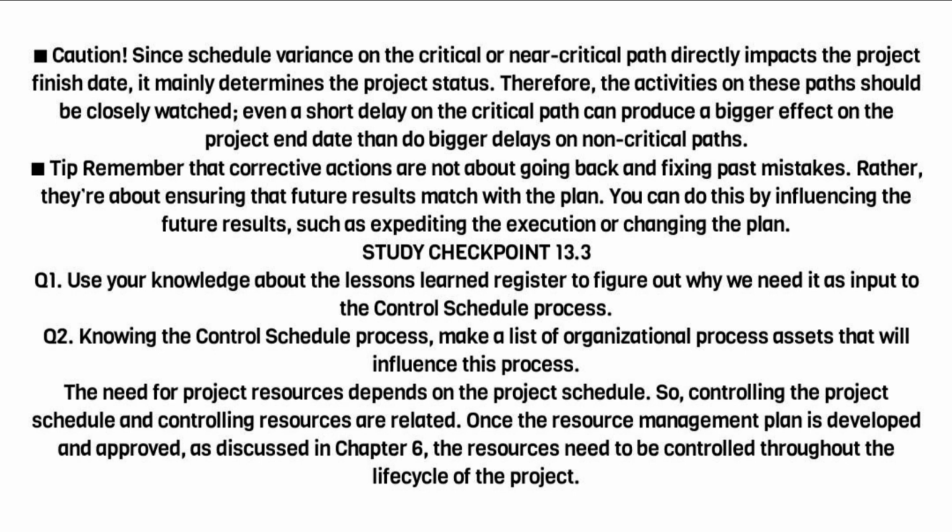Tip: remember that corrective actions are not about going back and fixing past mistakes. Rather, they're about ensuring that future results match with the plan. You can do this by influencing the future results, such as expediting the execution or changing the plan.